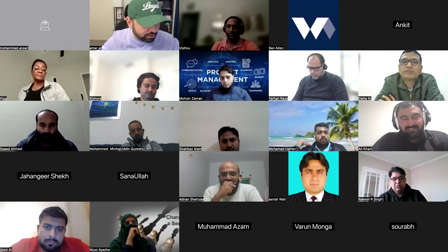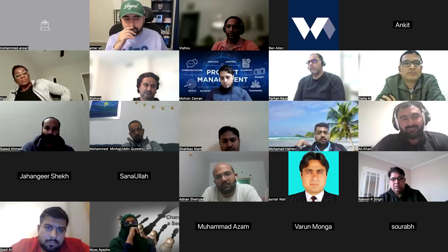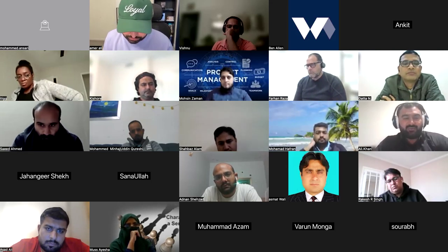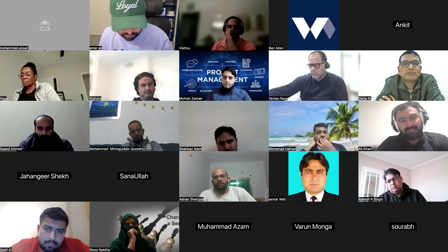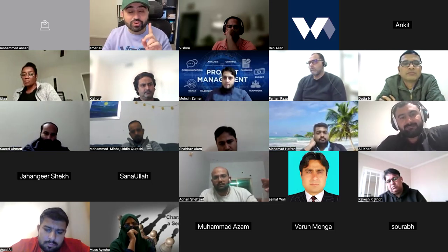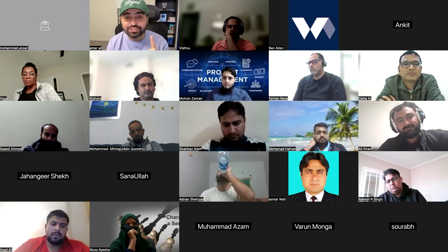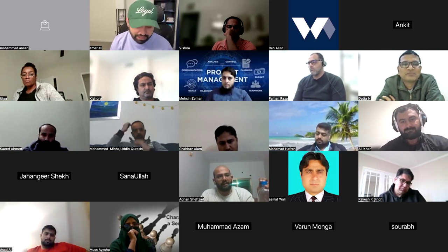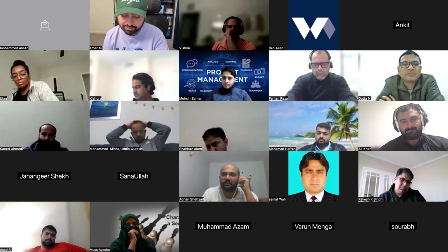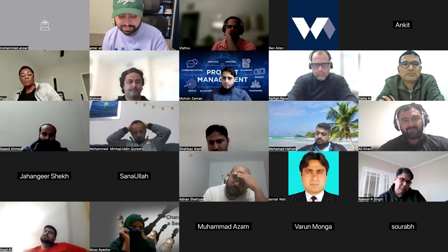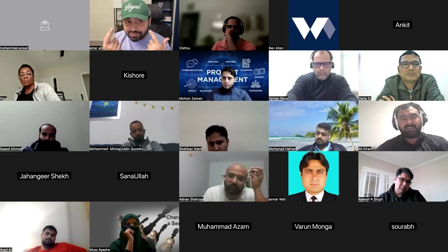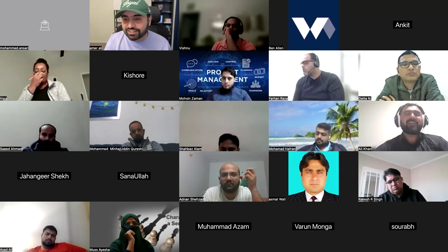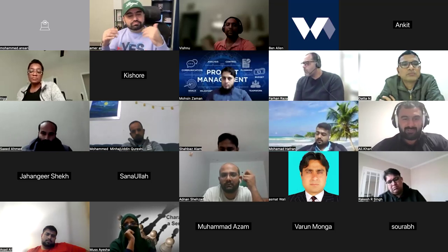Yes, actually, my question: once we have a stakeholder, we will put him into the stakeholder register. Yes. We will update the stakeholder register. Yes. And due to adding this stakeholder, we will update the communication management plan. No. First, we will raise the change request and the stakeholder plan will be updated. Because of that update, if the communication plan needs to be updated, then we will update the communication plan. So we will update the communication management plan because of adding any member, depending upon the requirement. We don't just depend on any key stakeholder.